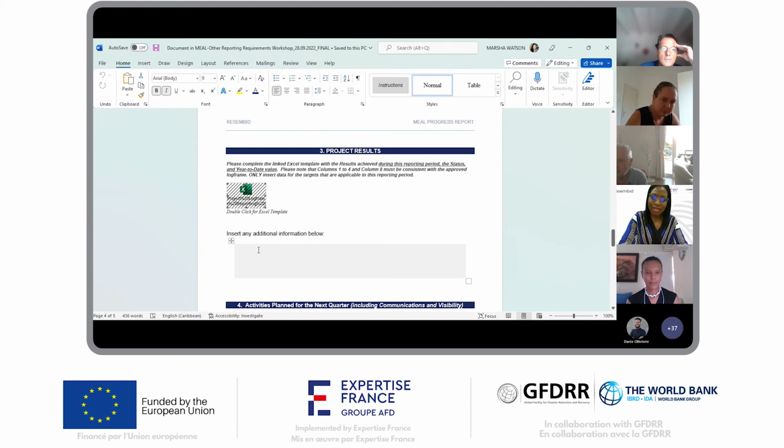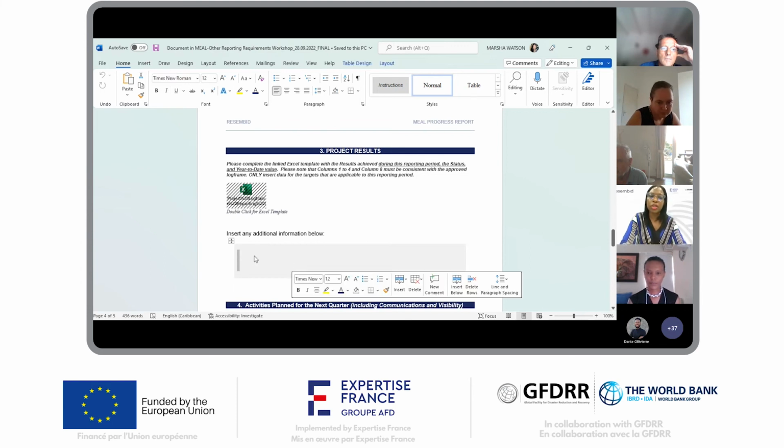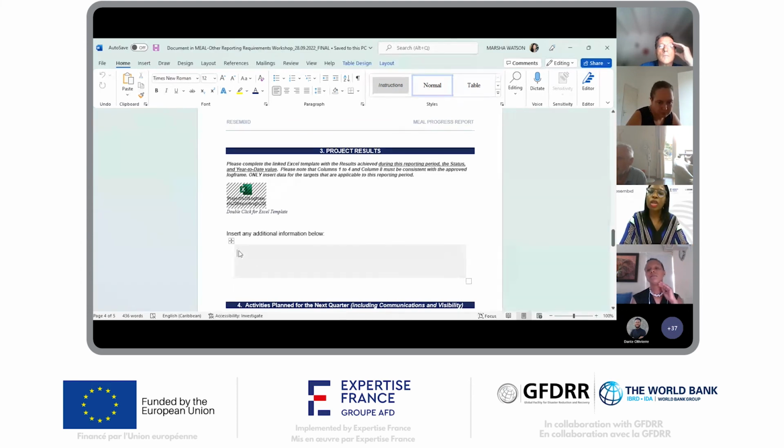So this little box here provides you with the opportunity to explain why the project was unable to train all 10 male staff and all 5 female staff. So why did we just do some? It may be that they were not available, but it's very important that you justify or explain why there's a variance between what you had planned for the quarter and what has been actually achieved.